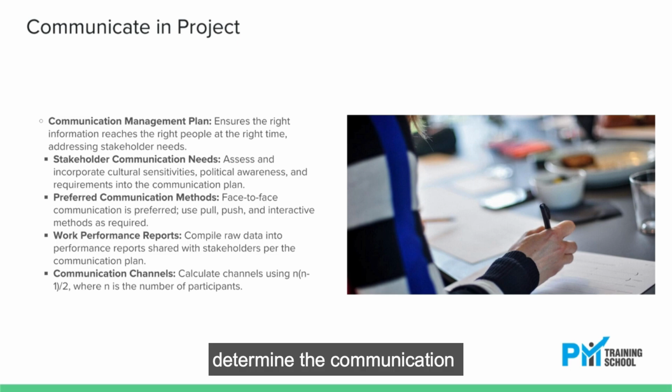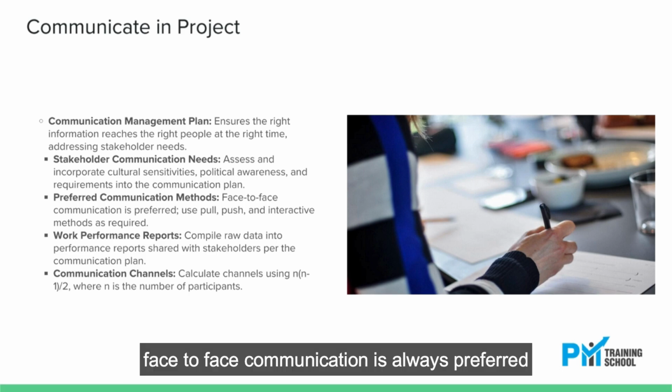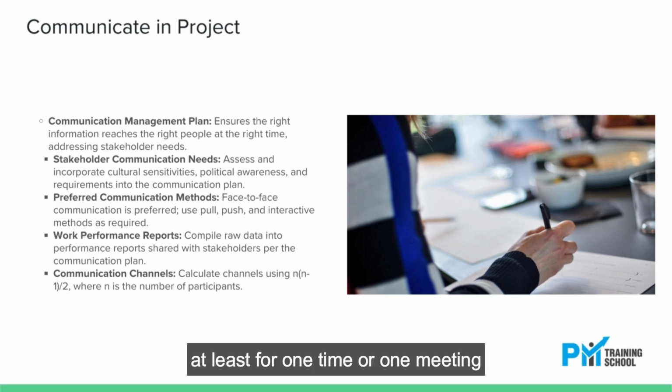Determine the communication needs of each stakeholder based on cultural sensitivities, political awareness, and communication requirements, then incorporate them into the communication plan. Face-to-face communication is always preferred, and whenever a virtual team has a challenge in communication, try to have them co-locate at least for one time or one meeting. Use pull, push, and interactive communication, or a combination of them as required. Whenever communicating, understanding the political awareness and cultural awareness is important.